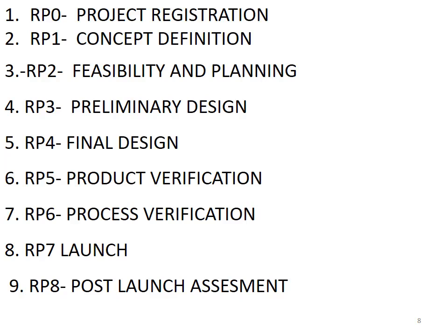So here we have to develop the concept in feasibility and planning. Then we go for the preliminary designs. They create the preliminary designs on the basis of the various concepts, review concepts with the customers, conduct a preliminary design review, build and test alpha prototype. So here in preliminary designs, as per the customer needs and expectations, we are developing so many concepts, and we